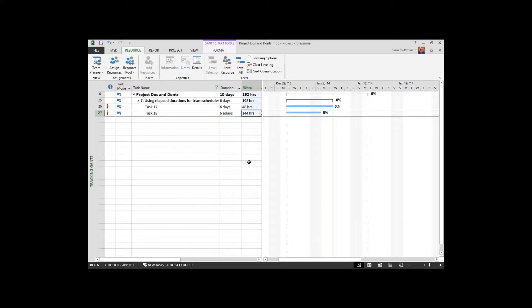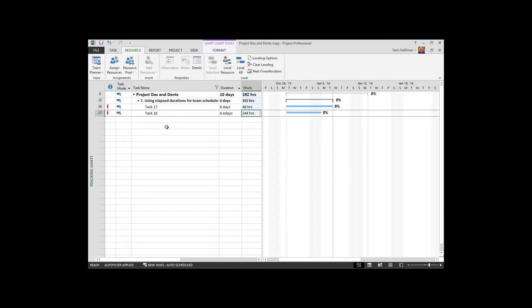Assign a resource to a task that is elapsed durations, and you're talking about giving that resource a 24 hour day for the run of that duration. So 144 hours of straight work. This person would probably drop at the end of it.